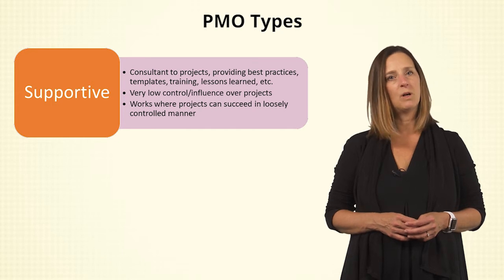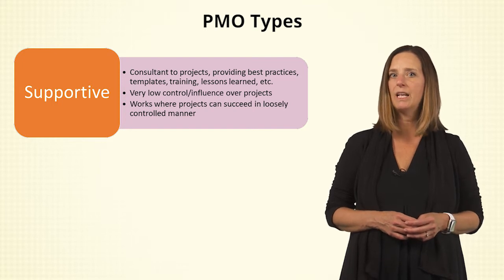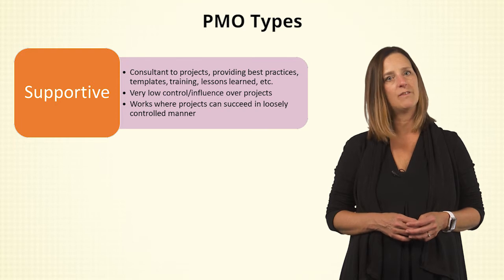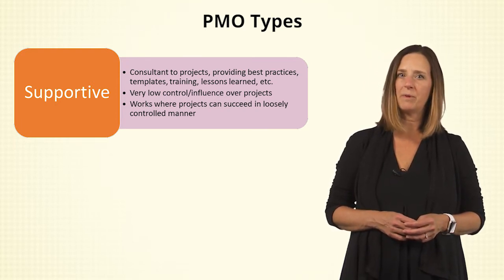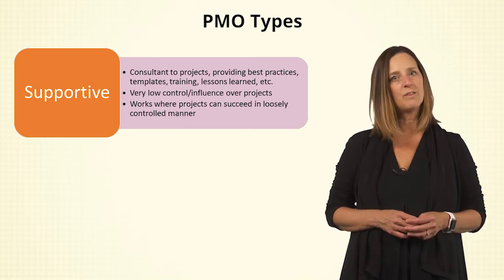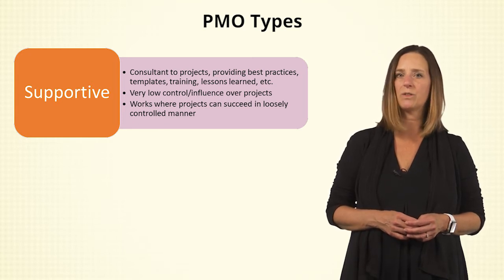A supportive PMO acts as a consultant to projects by providing access to best practices, templates, training, and also provides information and lessons learned archives from past projects. You can consider this type of PMO as a library of project information. The supportive PMO has very low control and influence over the projects it supports.